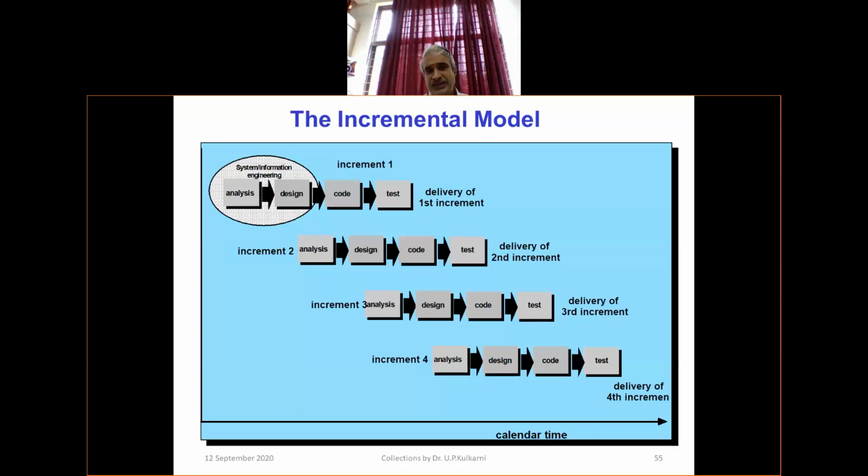Another thing is that it is so complex and huge that I may not have the manpower to fully deploy on it, to match their financial distribution over 10 years. So with the team that's available, I go for a 1 year contract and release this particular increment. This iteration I go through, then in the next iteration I pick up another thing and develop it. So the incremental model sounds good from both the industry perspective and the client perspective.